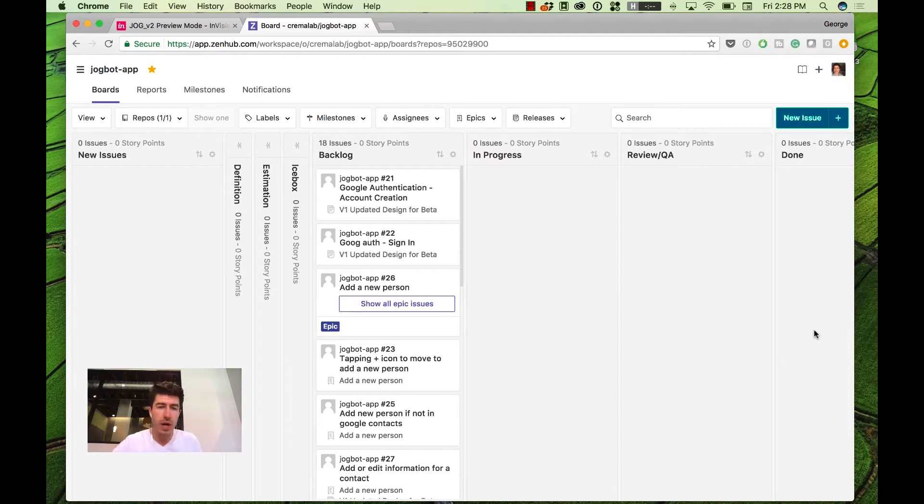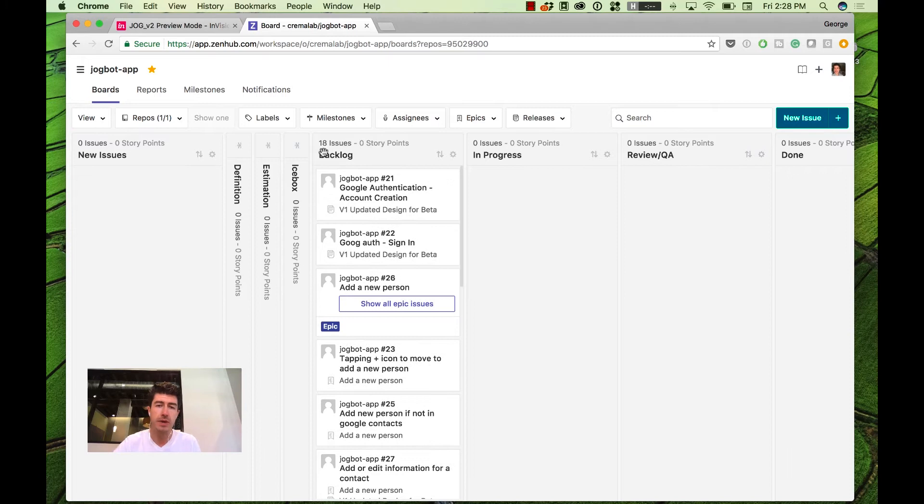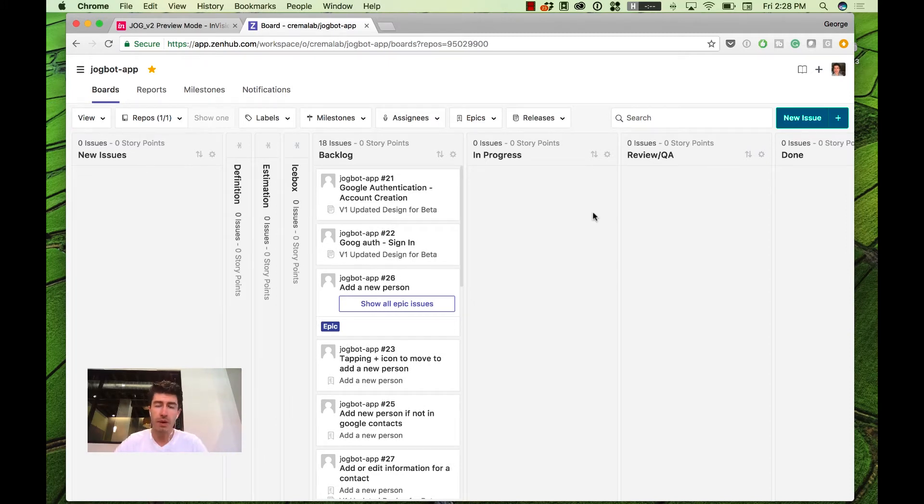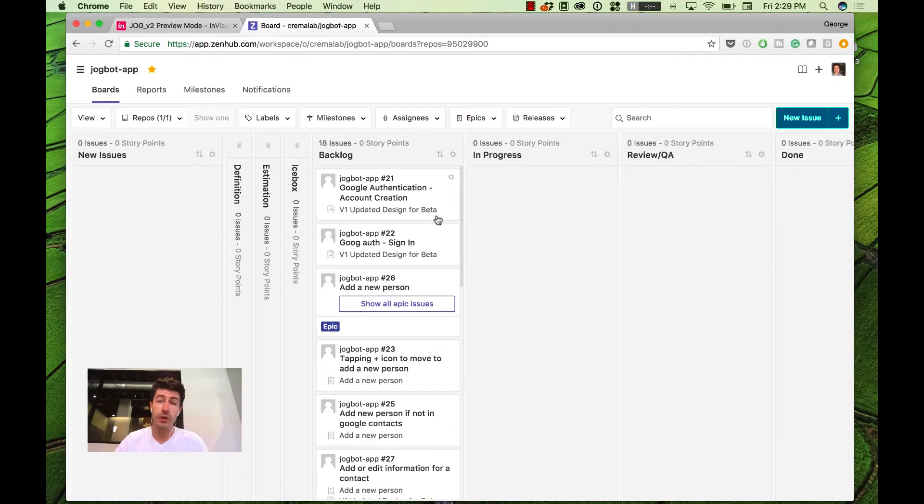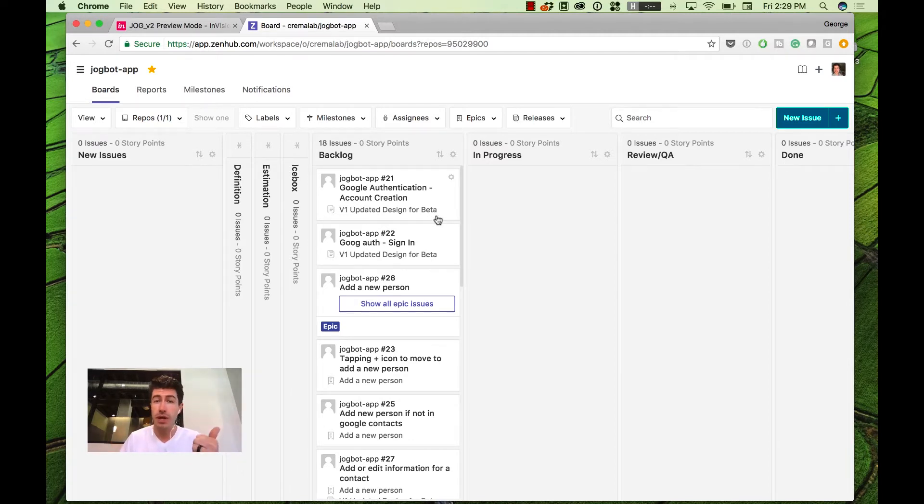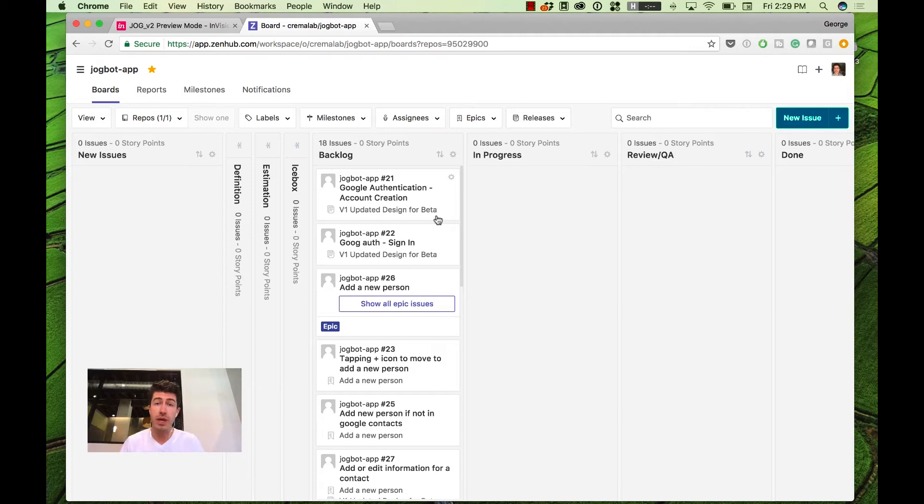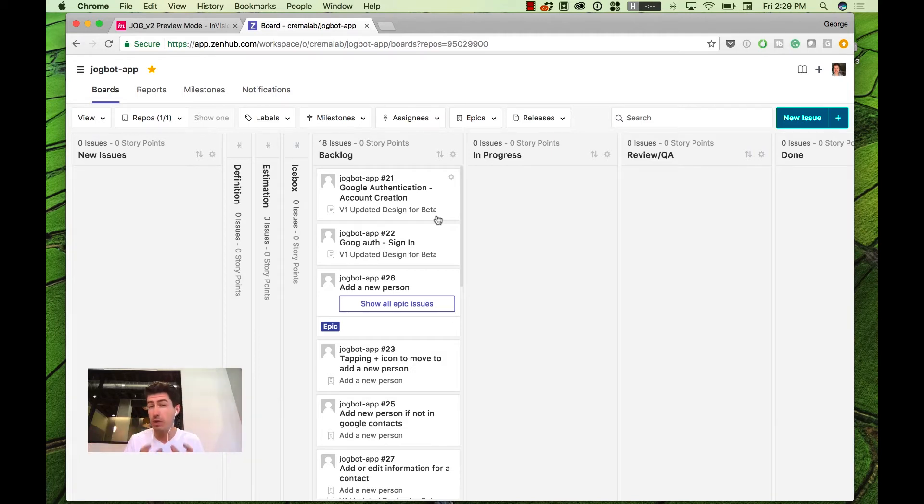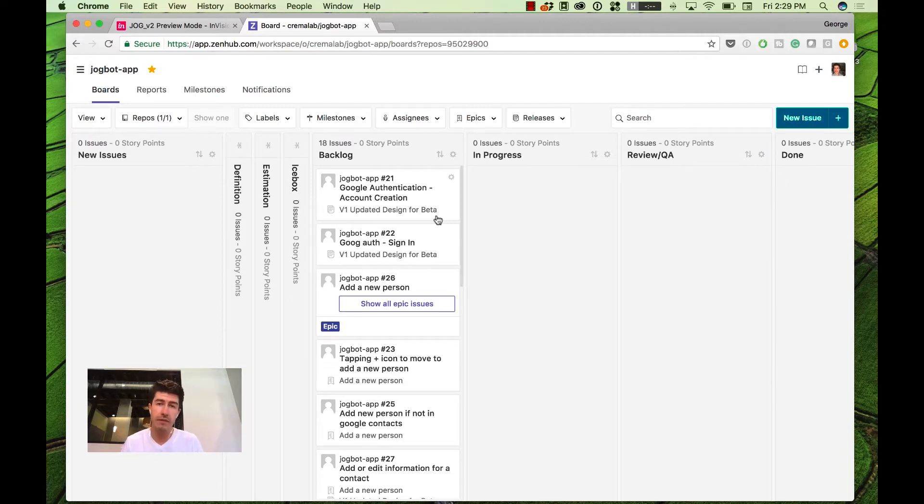You'll see here already that in the primary space, there is a number of different columns. But for today, we're going to really focus on how to write a new user story. Now, there are three parts to a user story. There is the user itself or the definition of the person that's going to be doing the thing. There is the functionality you want that person to do. And then there's the outcome. And honestly, we don't get too stuck in the formatting. We just want to make sure that the team understands what do we need to build and why are we building that feature.